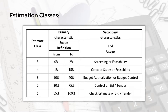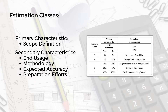Starting with the estimation classes, we have five classes of estimate: class 5, 4, 3, 2, and 1. What differentiates these classes from each other? We have two things: the primary characteristics and the secondary characteristics. What makes a class 3, for example, a class 3? It depends on some primary characteristics and some secondary characteristics. The primary one is the scope definition — this is the most important characteristic that differentiates the estimate classes.